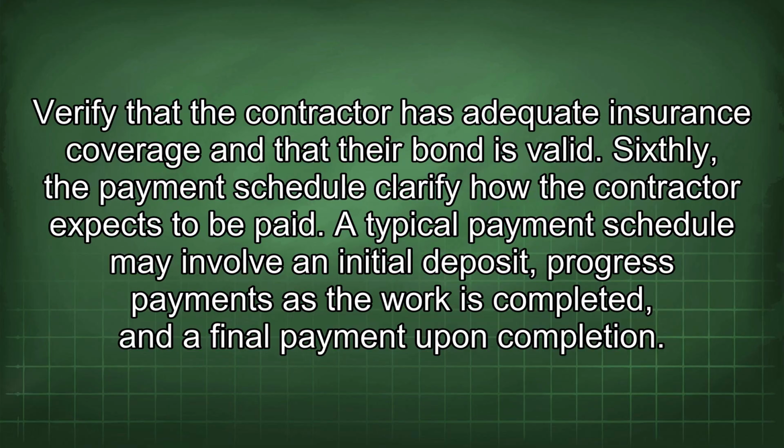Sixthly, the payment schedule. Clarify how the contractor expects to be paid. A typical payment schedule may involve an initial deposit, progress payments as the work is completed, and a final payment upon completion.